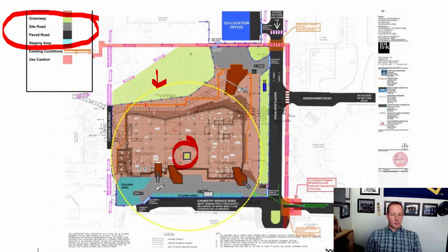This shows me that we can reach all areas of the building with our tower crane. And then it also shows me what we're going over the top of outside of our job site area. We're going over the top of a road. We also are going over the top of a staging area. This is where our trucks are coming through. You see the trucks here and here. And so we can get to our delivery routes with our tower crane to get things off, put it in the staging area. Staging area then goes to the building.